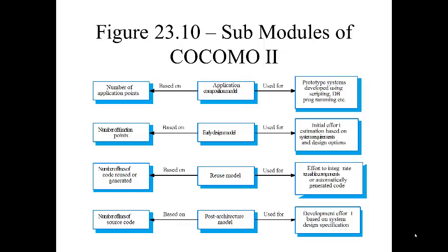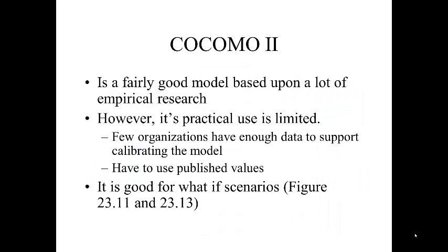In addition to these four sub-models, COCOMO 2 has a larger number of factors that influence M and B is a bit larger. COCOMO 2 is a fairly good model based on extensive empirical research by Boehm and his team at USC. However, its practical use is limited — few organizations have enough data to calibrate the model for their own purposes, so you have to use published values. It is very good for what-if scenarios, featured in figures 23.11 and 23.13.